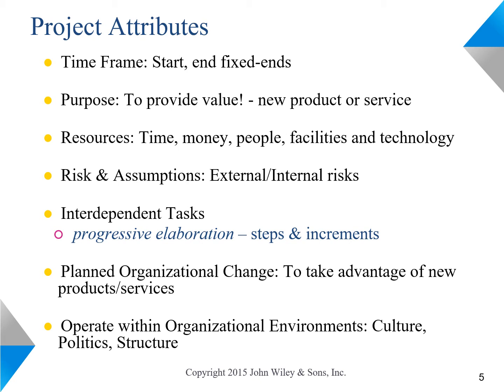For example, if we have a very conservative organization, we may need to include more cost and schedule contingencies so that we never exceed the budget or the schedule of the project.